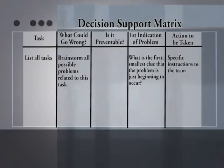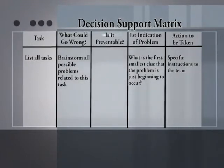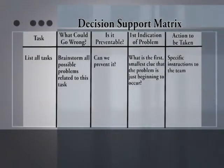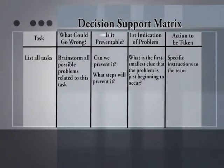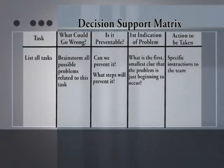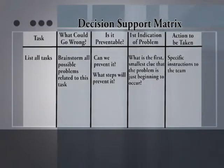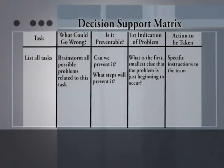First, we go through this exercise to identify all the problems. Then as we do that, we ask: can we prevent this problem? And if we can prevent it, what steps do we need to take? We find these preventive measures, go back into our plan, incorporate them, and now we can cross that problem off the list.